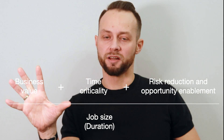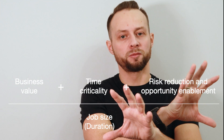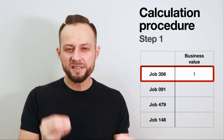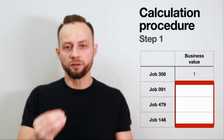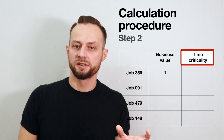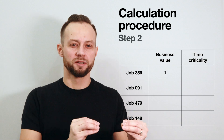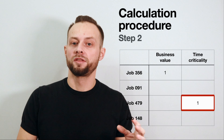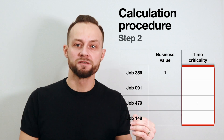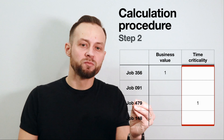Step one: start by evaluating only the first term — business value. Choose the least valuable job in the list, set it to one, then estimate other jobs relative to one — how much more valuable are they — filling all cells in that first column. Step two: go to the next column — time criticality. Choose the least time-critical job, set it to one, then estimate other jobs relative to this one — how much more time critical are they.